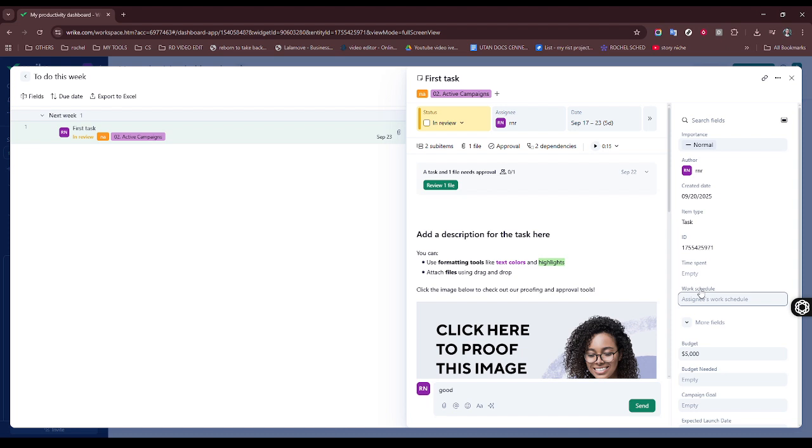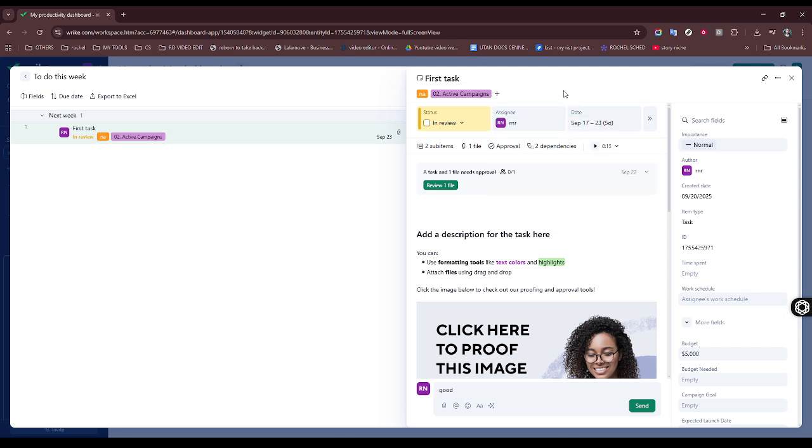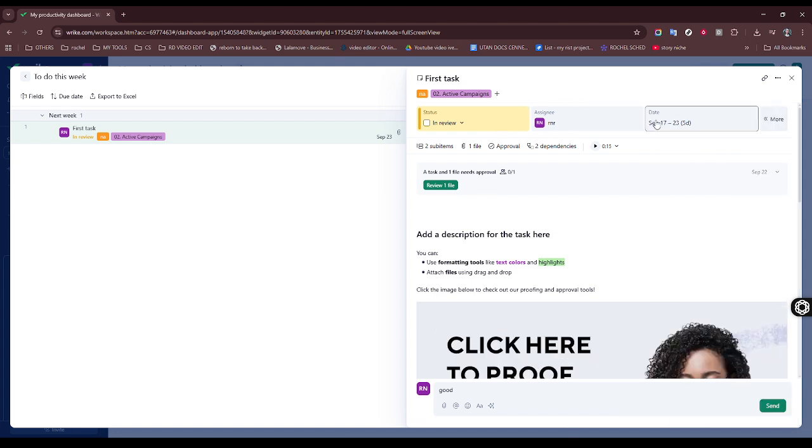To establish a link, you can either search for the specific task you want to connect with or select it from the list provided. Once you've identified the task you want to link to, go ahead and click on it. This action will create a connection and allow your project management tool to automatically adjust timelines based on this relationship. This is particularly useful when multiple tasks are interdependent, as it provides clarity and vision for the entire project lifecycle.